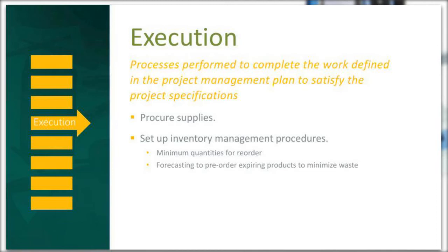Remember, you also have to worry about expiry management. You've got to forecast those things into pre-order. Many clients want us to manage that for them, and the reason is you don't want to have a study put on a delay simply because your syringes were out of date. Now you have to reorder, and heaven forbid they're a special order.